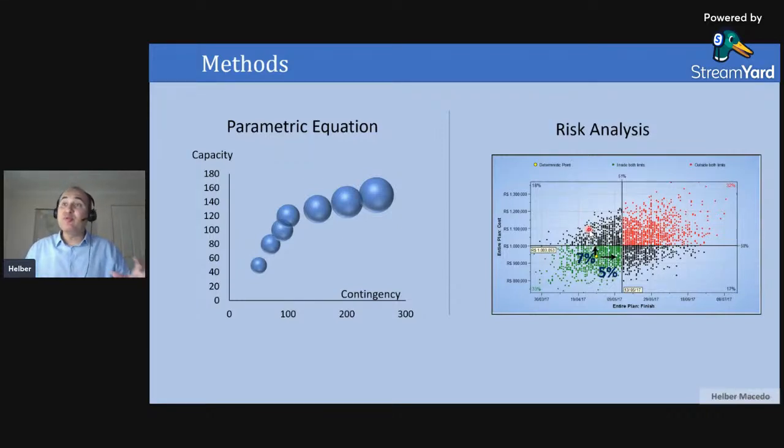Here, what I will do, I will use a Monte Carlo simulation, and I will first identify all the risks that can affect my project, define uncertainties as well, and I will then run simulations, and it will provide thousands of scenarios, and I will be able to select, okay, this yellow dot here is showing my deterministic number. If I apply 5% of time contingency, here is the best scenario that's showing schedule and cost together.